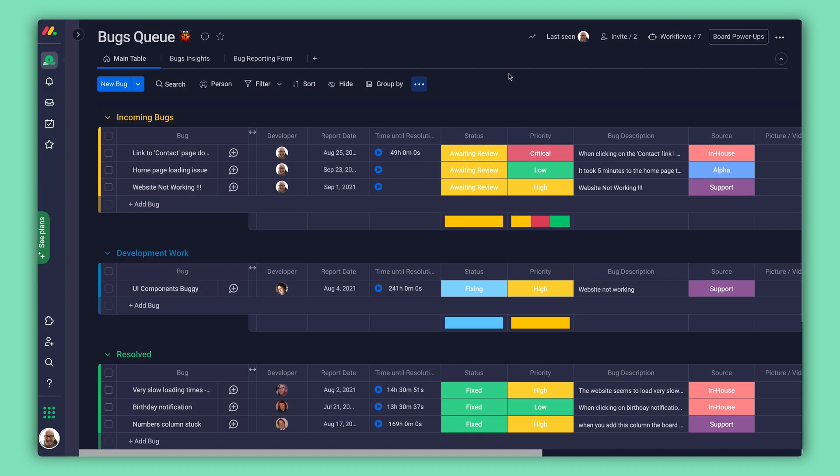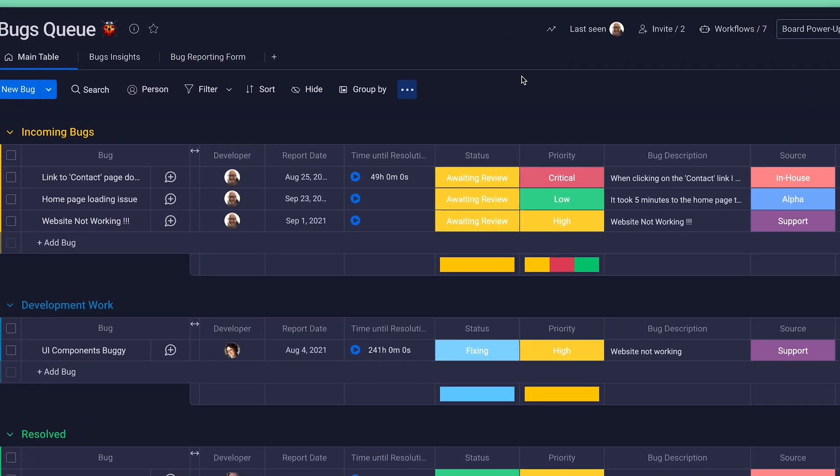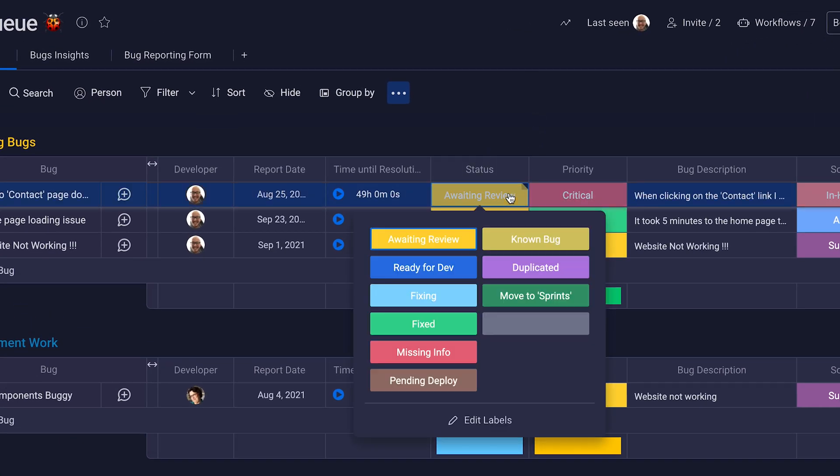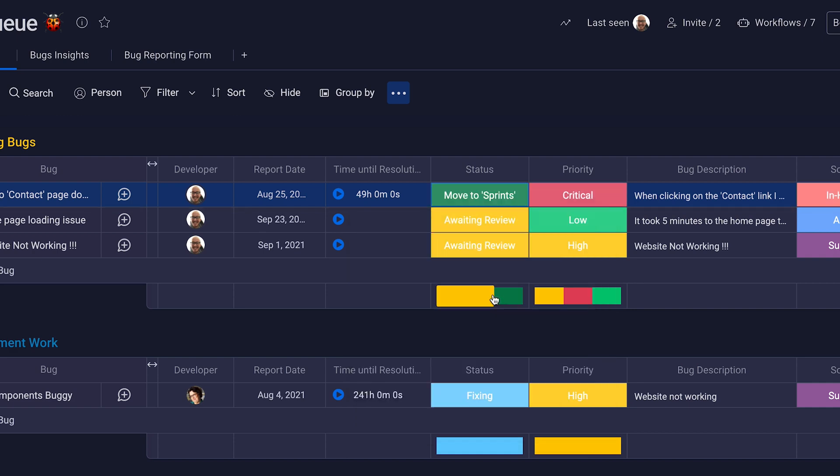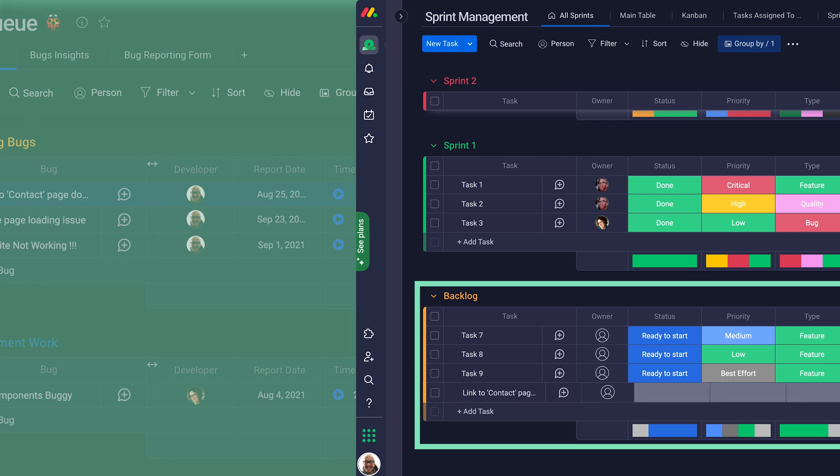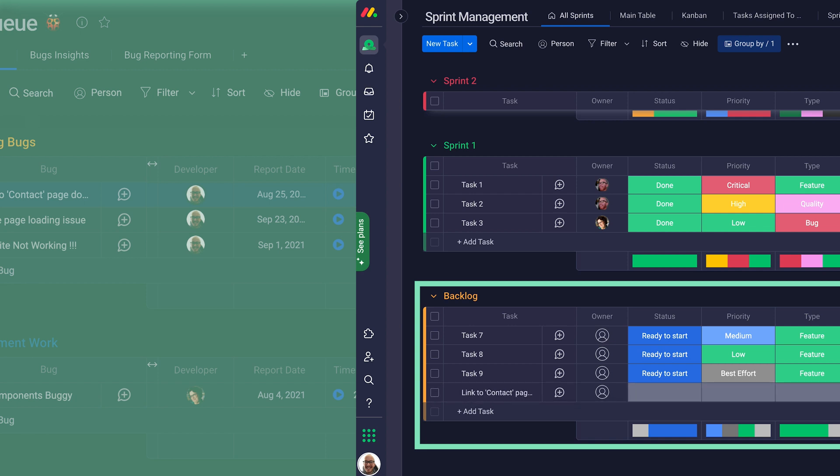With automations, the bug-busting process has evolved. Check this out. When we toggle the bug's status to move to sprints, an automation triggers and creates an item in the sprint management board backlog group, ready to get squashed.